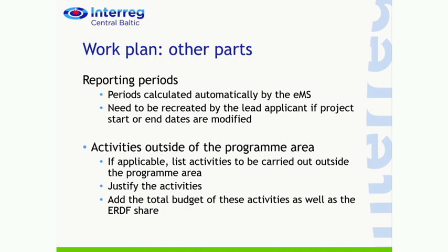And generally, travel costs, if you travel outside of the program area, which is allowed in justified cases, of course, these travel and accommodation costs don't fall under this category, so these are not considered to be activities outside of the program area.